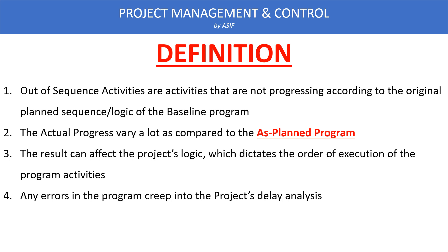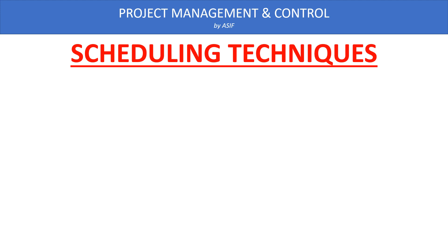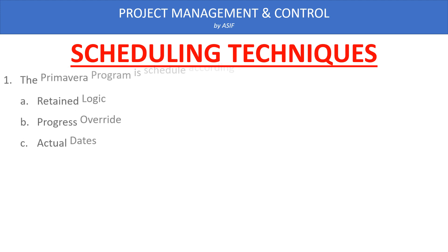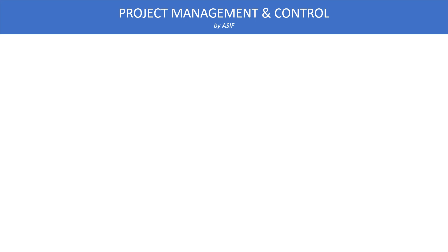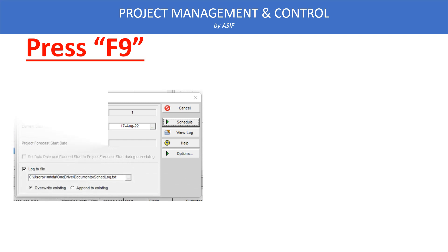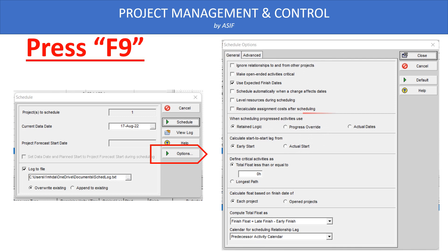It is very important to remove auto-sequence activities from the updated program. Primavera P6 offers three types of techniques to update a program: Progress Retain Logic, Progress Override, and Actual Dates. To access these techniques, press F9 — the scheduling dialog box will open. In that dialog box, click the Options button, then go to the General tab, where you will see these three techniques listed. Normally, consultants and clients are recommended to use the Retain Logic technique.